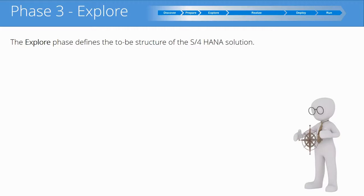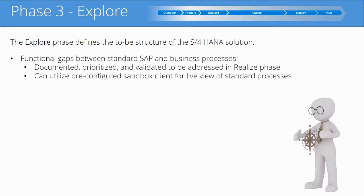The third phase of the methodology is Explore. In this phase, we define the to-be structure of the S4 HANA solution. Functional gaps between standard SAP and business processes are discovered, documented, prioritized, and validated to be addressed in the Realize phase. Ideally, the consultants and end users sit down and walk through in the pre-configured sandbox client an entire end-to-end scenario, seeing how SAP does it out of the box and comparing it to how the enterprise does it today. They assess whether SAP needs to change, whether the business can change to align with SAP standard, and how to fill those gaps. All findings are documented and assigned a priority for work during the Realize phase.